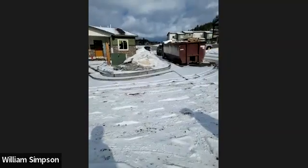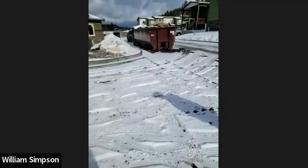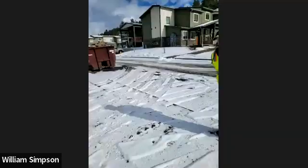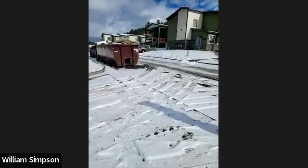No, I think that's a good overview. I know where you guys are at now. Given that we're coming down to the end a little bit, I'll want to do this next month for sure. If you've got a day in mind already, let me know, or if you need to check your schedule. I'll have to check the schedule. I usually try to tie it to when a pay request comes in, so I can come down and make sure we're in agreement. But it'll be about this same time next month. Yeah, that works quite well.